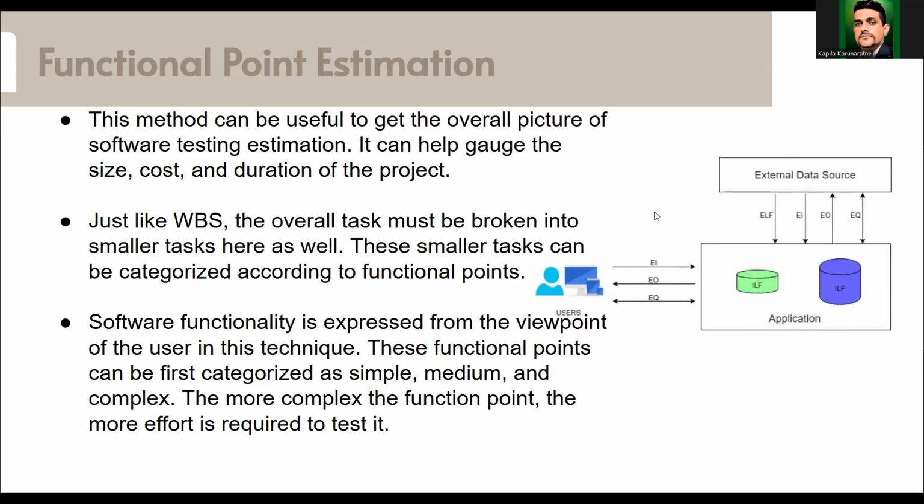Based on the number of units you find, we call it the total function points. Once we decompose the entire application using functions and integrations, you will get a number like 100, 200, 300, something like that. That is your function points, and that will be your effort. For each function point, there is a certain industry-standard base effort required.